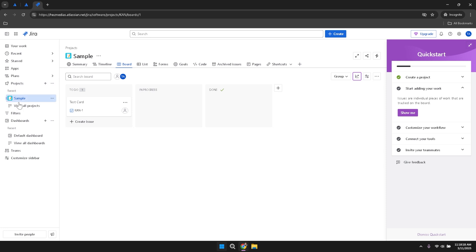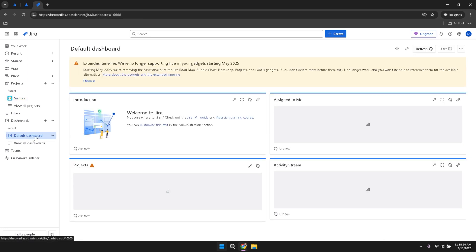Setting up automation rules within Jira can save time and reduce the risk of errors by automating repetitive tasks. Define rules that trigger actions based on specific events, such as moving an issue to a different status when a task is completed or sending notifications when deadlines are approaching. Automation helps maintain consistency and ensures that important actions are executed promptly.